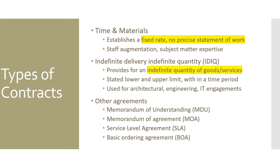The third type of contract is Time and Materials (T&M), which establishes a fixed rate for a particular skill set or competency without a precise scope of work. It is perfectly suited for staff augmentation, subject matter expertise, and adopting agile methods like Scrum — since in agile the scope is flexible, T&M is preferred over fixed price.